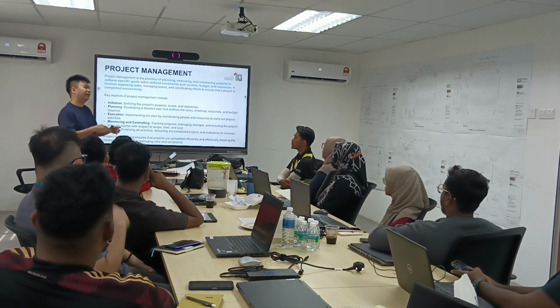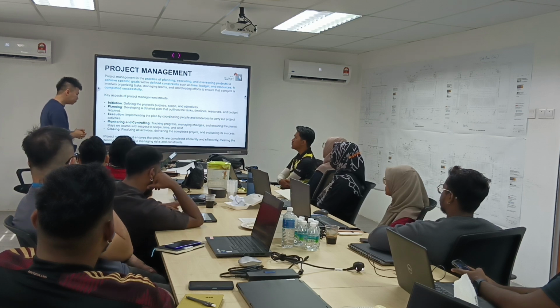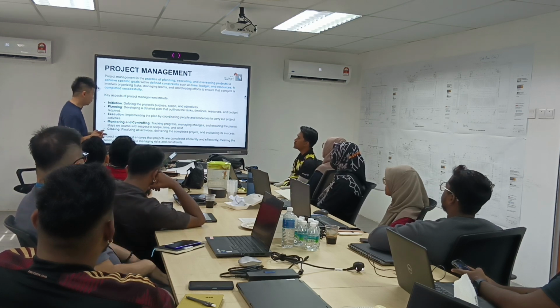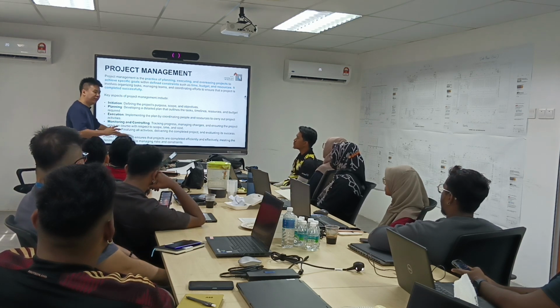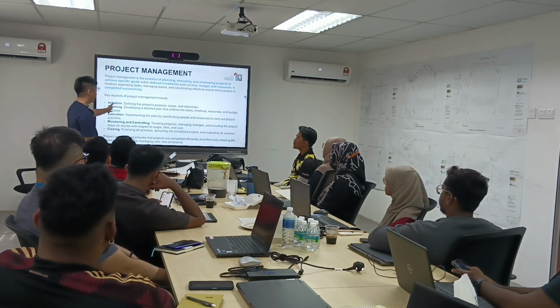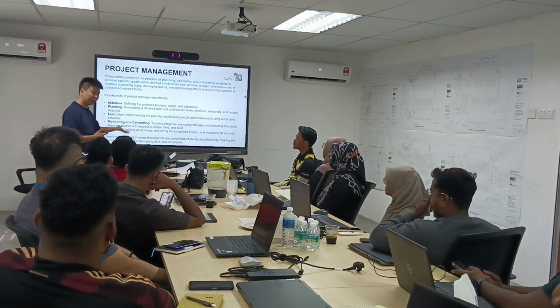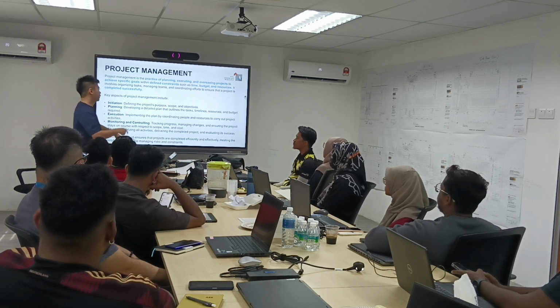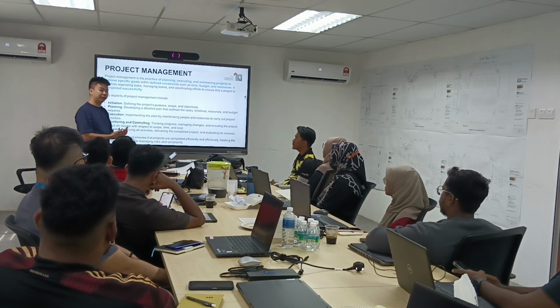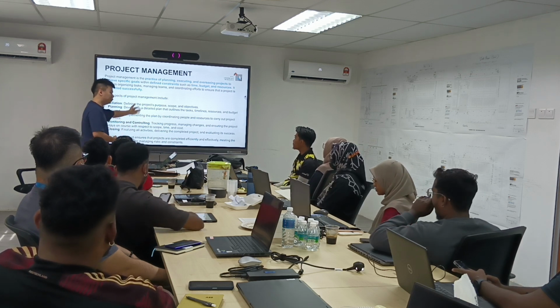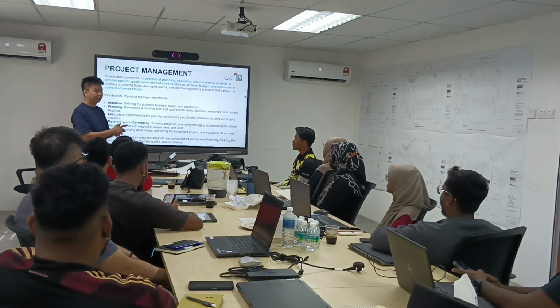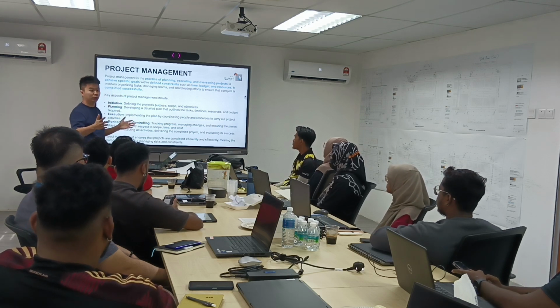to you. Okay, let me give you another example. Let's say today we want to move this TV from outside into this room. In terms of planning, what you need to know, you will tell yourself, I need about 1 hour plus to move this whole thing in with 2 persons. This is how you plan your resources. So can you do this with 1 person? Yes, you can, but the time will be longer. So this is a triangle lah. Later we will talk about it.